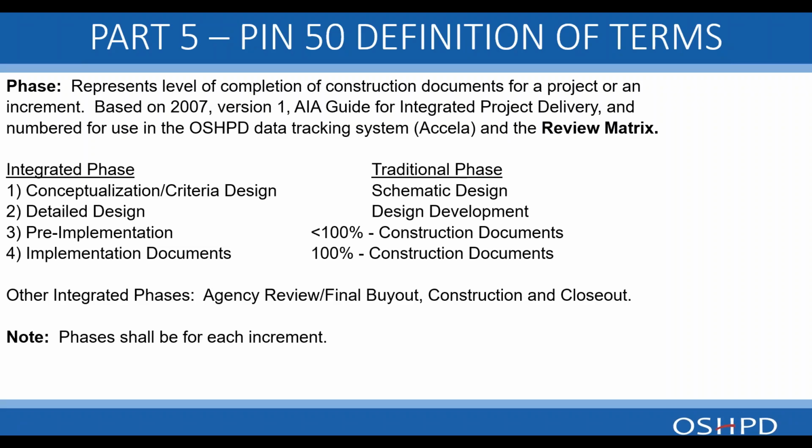So a comparison side by side of the traditional phase and the integrated phase, you see here where conceptualization criteria design is equivalent to schematic design, detailed design is equivalent to design development, pre-implementation is equivalent to something less than 100% CD, and then implementation documents is the 100% CDs.